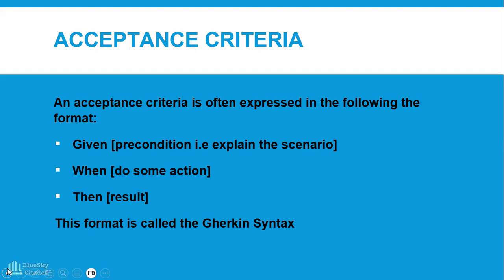Okay? I'll take it again. Given, when, then. And this format is called the Gherkin syntax. Given explains the scenario. When, it describes the action that will be completed. And then shows the result. As a result, that's what happens because of that action that has been taken.